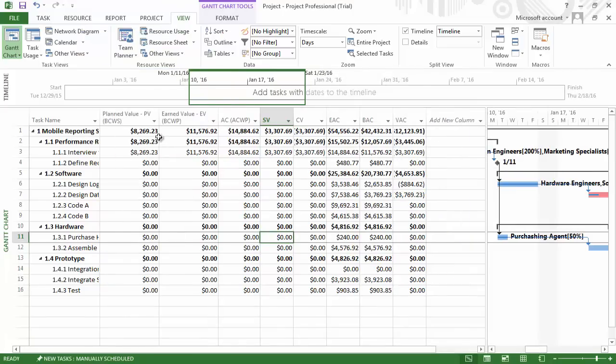Now we have in front of us the earned value information. Since our status report date is on the 10th of January, we only have activities that actually have been completed up to this point that have earned value information associated with them.